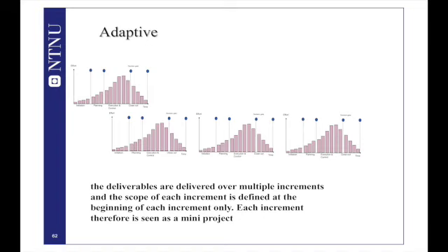If you want to plan for 2 years, there are many surprises that you might not know, or you don't have the full overview of. But if you cut these 2 years into 1 month periods, you limit the scope and you limit your exposure to uncertainty.